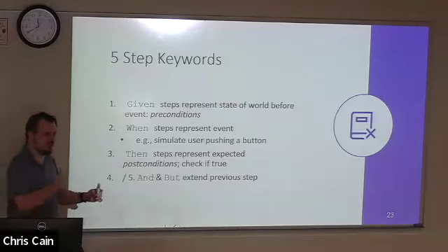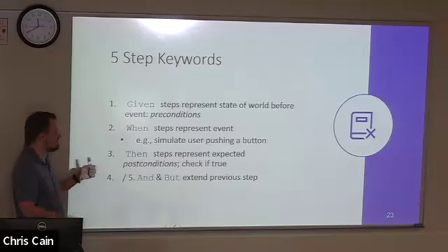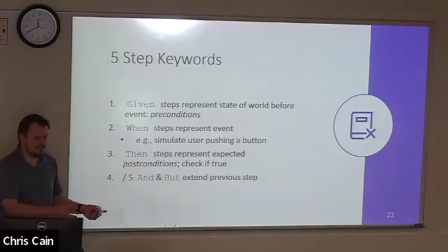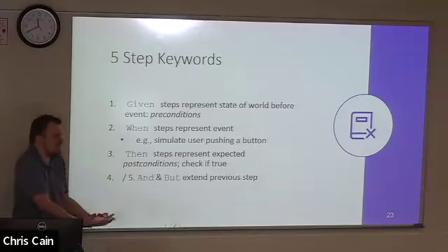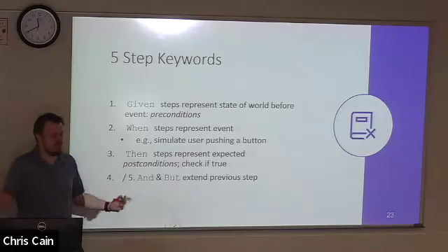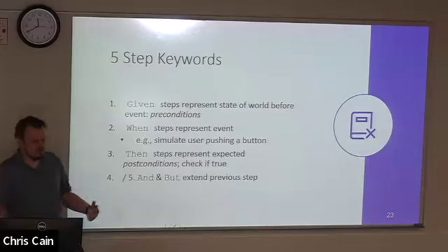And remember that we go through this whole cycle of the waterfall every sprint. We're going to create a skeleton program based off the very basic user stories. Then we're going to hand it to the client and say, play around with this. How usable is this? Do you have any suggestions? What would you add to this? Is there anything extraneous that you want us to remove? You scrap that prototype and you start building the application based off the feedback you get from the client about what they're actually looking for. So you don't have to talk completely in the abstract. You build them something, some bare bones. You get the feedback and they're actually using the bare bones system you've created.